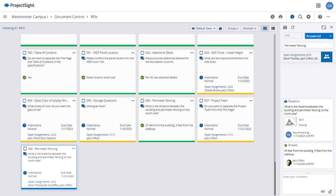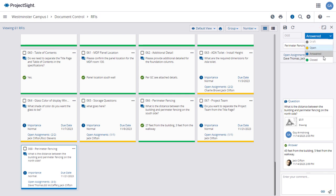If you need to provide additional information, you can add a comment and an attachment. You may also want to click the Expansion icon to enter any impact on cost, schedule, or drawings, if any. If you are satisfied with the answer, you can change the status to Closed.